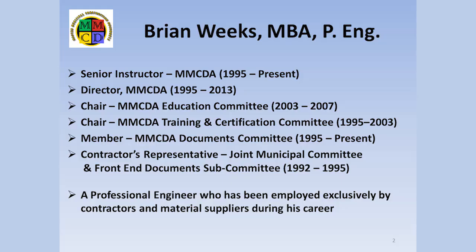This seems to be an extreme penalty for an administrative failure. However, the GCs were written this way to ensure no surprise claims could arise later and ongoing claims could be challenged when the activities were fresh in the minds of both parties.